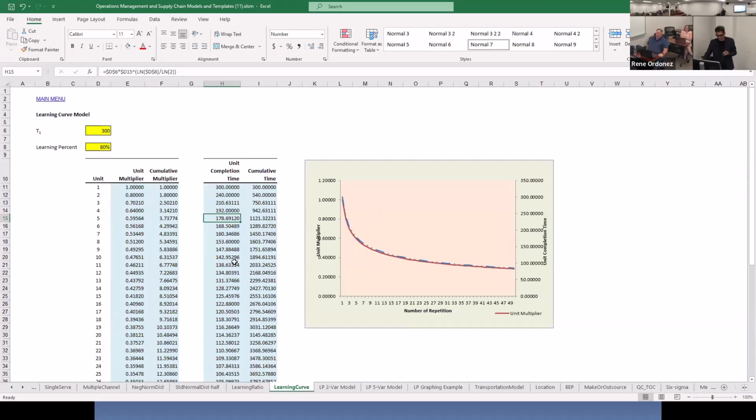Yeah. The first 5 planes, that would be this. All 18 airplanes, that would be this. So if you were the project manager and you were trying to estimate the manpower that will be required to complete 18 jet aircraft to refurbish 18, that will be the basis for costing your labor, direct machine hours, overhead. So if you have cost per hour on all these, you should be able to generate an estimate of the cost. Now, if you were bidding on a project to refurbish 18 jet aircraft, then you have your cost, direct cost, overhead, materials, plus labor.